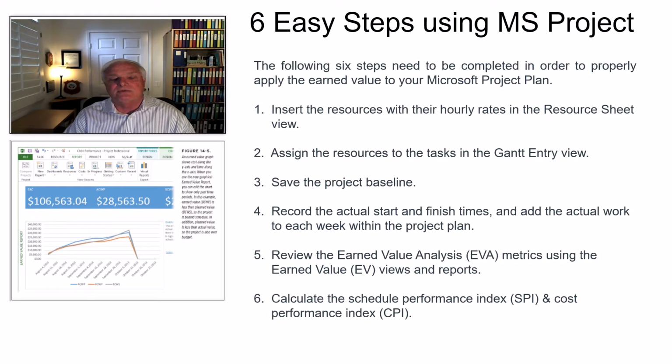So if you're trying to come up with earned value, how do I determine earned value in Microsoft Project 2013? It'll give you a list of instructions. So let's just talk about it from a generic perspective, which is what this is. You're going to insert the resources with their hourly rates in the resource sheet view. So you need to resource load your project, and then you have hourly rates associated with that. That way you know what the cost of the labor is going to be.